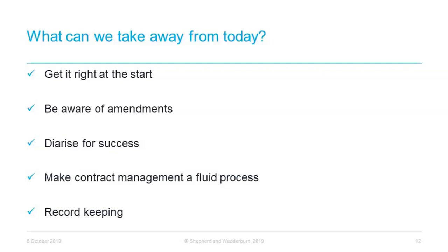Many of you listening today will be aware of smash and grab adjudications. These arise where payment notices are not issued in line with the requirements of the contract and the payment application becomes due for payment even if the employer considers the amount is not correct. Following recent case law, these types of disputes are currently in decline, with some commentators hailing the end of the smash and grab era. However, it remains essential to ensure that notices are given on time and that they comply with the contractual requirements as to form, i.e. sending it to the correct email or postal address. Diarising is therefore extremely important.